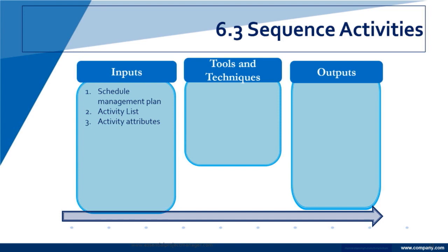For instance, if you're trying to pour concrete, concrete has a certain attribute to it. You can't do anything to it for a number of hours or days, depending on where you are, what kind of concrete it is, etc. So it's an attribute of the action, the activity of pouring concrete foundations. The same thing works in larger buildings if you're doing pillars, etc. But you get the point.